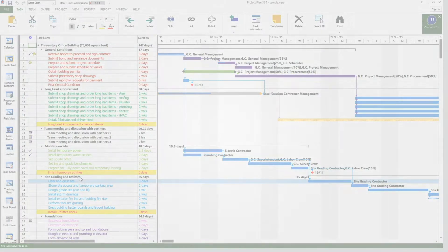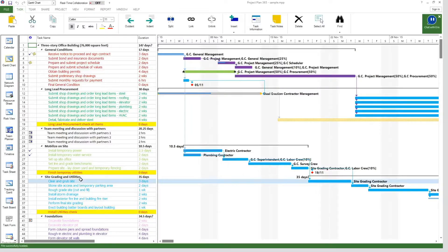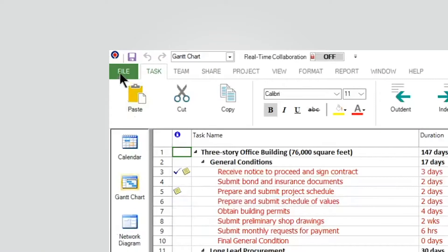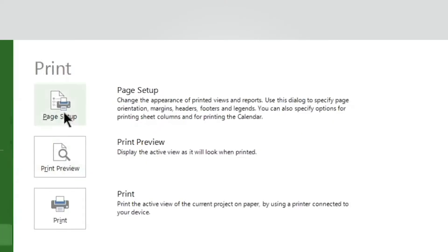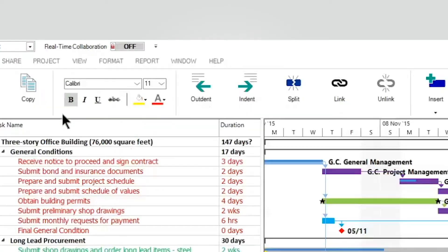Let's say that we need to print the entire Gantt chart view on A3 paper size with a landscape orientation and fit the entire view on one page. For this, we go to Ribbon, File, Print, and click on the Page Setup button.